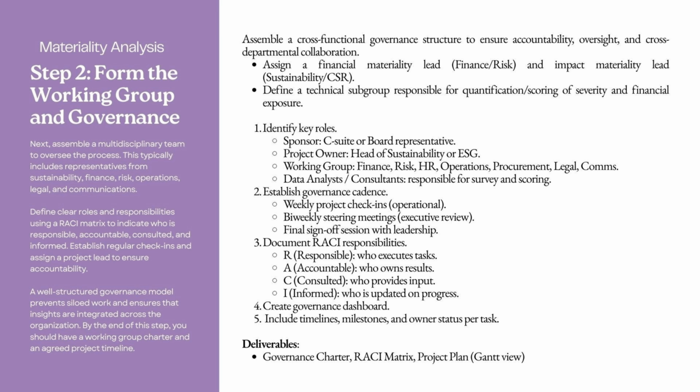This may include regular operational check-ins. A final validation and sign-off session with leadership. Roles and responsibilities are documented using a RACI matrix, clarifying who is responsible, accountable, consulted, and informed. Responsible roles are defined as those executing tasks. Accountable roles own the results. Consulted roles provide input.